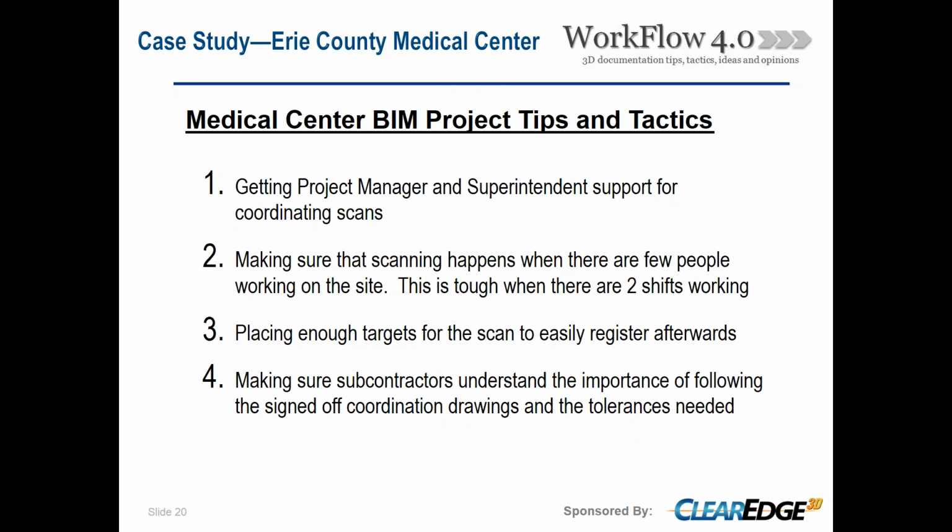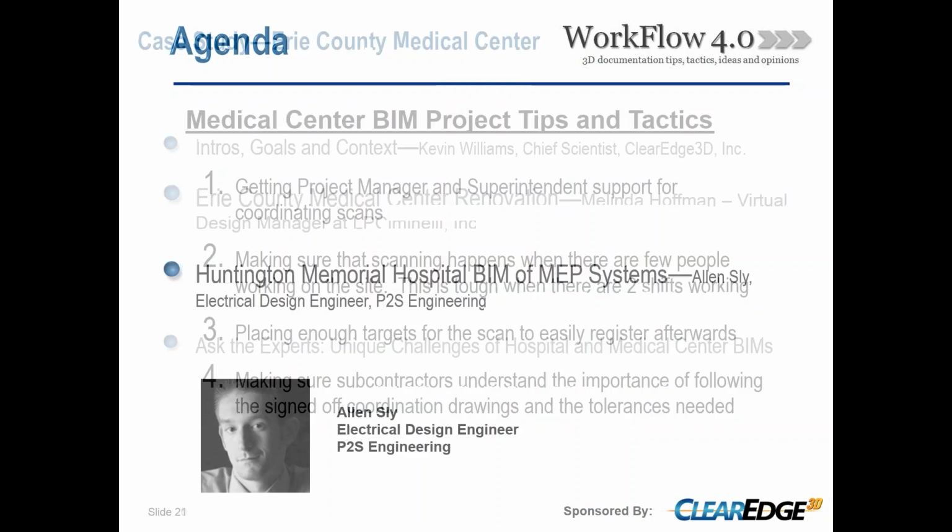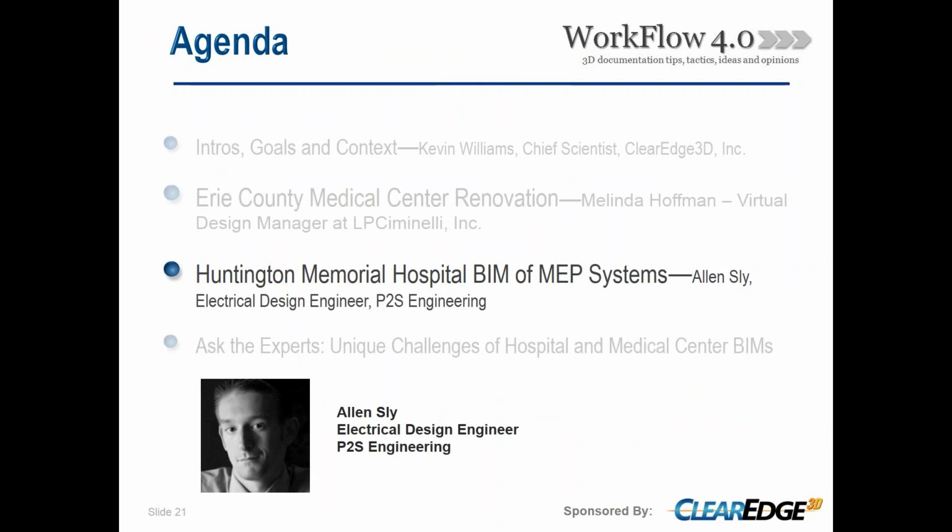And then making sure subcontractors understand the importance of following signed-off coordination drawings. While we've done as much as we could with scanning, modeling, and coordinating, if the subcontractors' foremen aren't following those coordination drawings, it doesn't mean anything. So stay on top of them, making sure they understand that. Going out to the field while they're doing their installations really helped them to start understanding what we were doing and how we were doing it. And with that, I'll turn it back to Kevin.